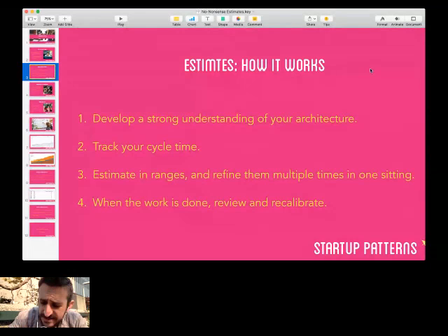The second thing is you really need to be tracking the overall throughput of your team. It may differ if you're an individual building a product all by yourself, but most of us are building software in teams and we have different functions. We're trading off different responsibilities. And so the overall process of producing software takes time. It's all about the cycle time from when you have an idea to when you've deployed that idea as a working feature. So tracking your cycle time is really important because it helps to establish a realistic sense of when you're actually going to get things done.